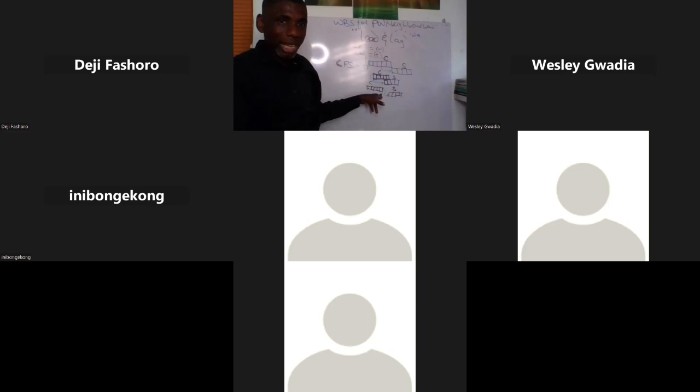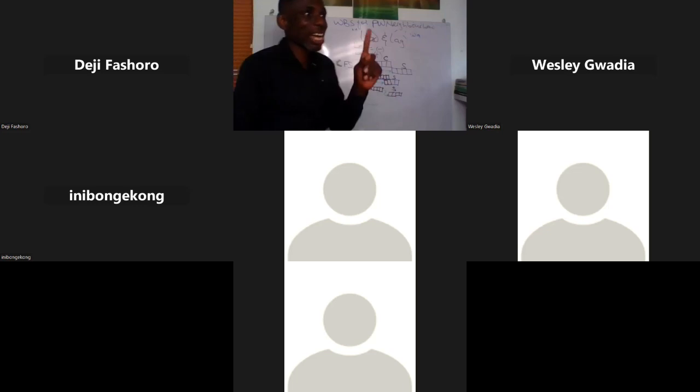Okay. Because lag is the amount of time you want a successor activity delayed in respect to a predecessor activity. And I've just given you one instance where you can have a lag introduced in your schedule, where you just tell yourself, I don't want to take this risk. Let me wait for the integrity test. Especially if you have been doing it and your concrete has been passing and you have mastered the process, you don't need to introduce lag.